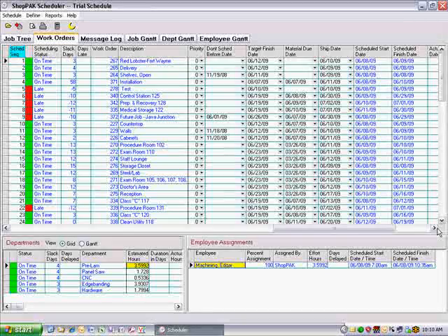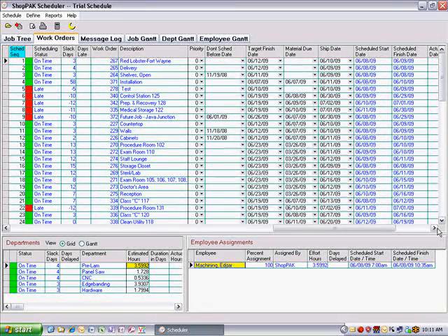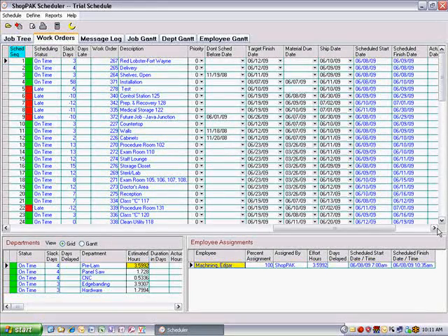Nailed work orders, on the other hand, do not get rescheduled, and thus their scheduled start and scheduled finish dates do not change. Moreover, the resource assignments tied to the work order do not change. Essentially, when you nail a work order, you are saying that you like its start and finish dates, and you want to commit the resources assigned to that work order so they can't be used elsewhere, at least for those dates that they are now committed to working on the nailed work order.